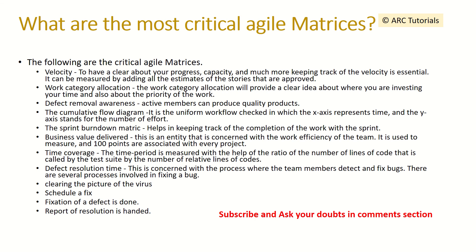What are the most critical agile metrics you follow? Key metrics include: velocity — how well the team is progressing on user stories and whether there are any impediments or rollovers — defect removal awareness, and the cumulative flow diagram. These metrics provide detailed analytics of the sprint team and the work being done, allowing us to track defect resolution and report resolutions, giving a clear picture of how the sprint is progressing.